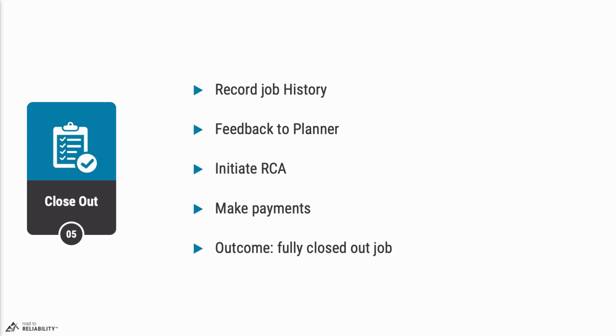Even if you have a highly effective reliability engineer who always picks up these things, you still want to give your maintenance supervisor and his crew the ability to flag something that might need an RCA. That way things get detected much faster and it builds ownership. The final part of closing out the job will be making sure that all payments are made and, for example, hire equipment is returned on time, etc. Ultimately, the outcome of this step is a fully closed job in the CMS.